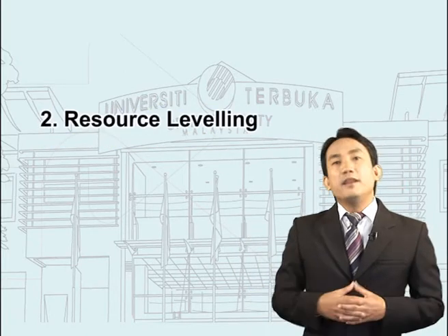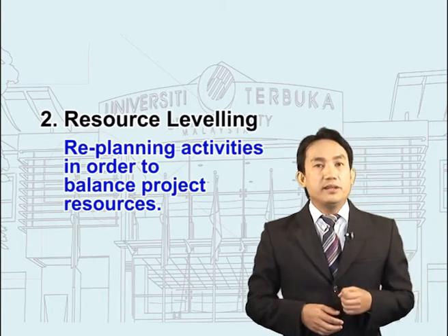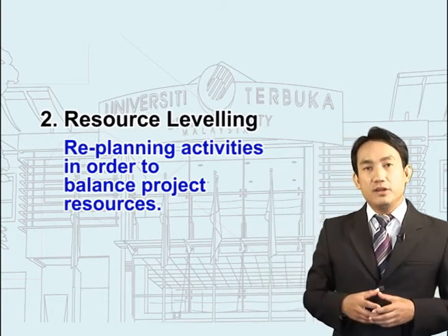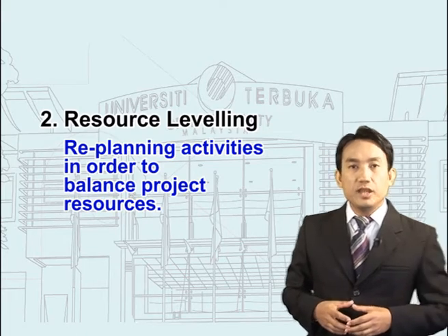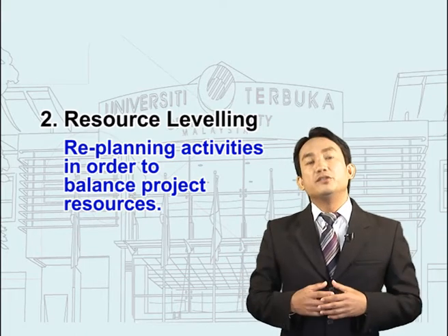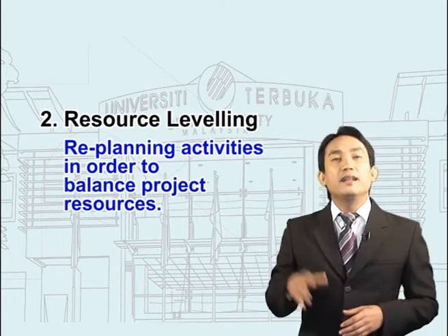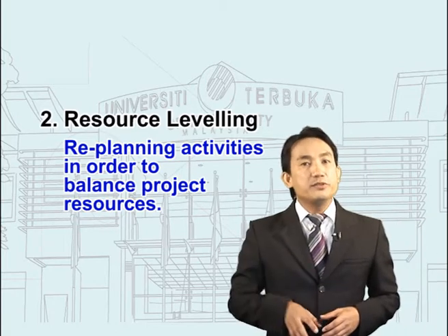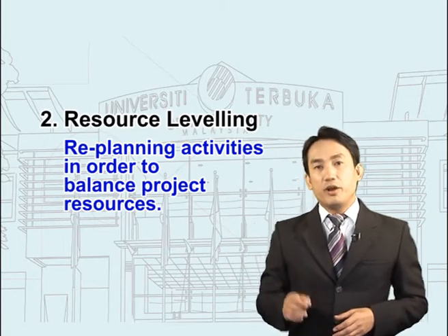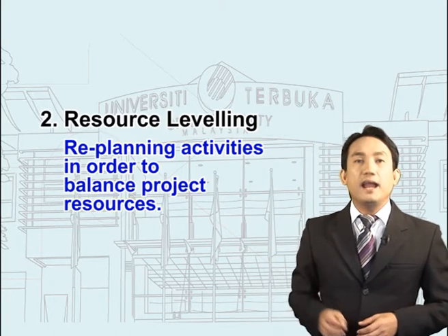Resource leveling. The purpose is to replan your activities in order to balance your project resources so that you are able to get resources when needed. This helps you to run your project based on your resource requirements and avoid any idle resources.